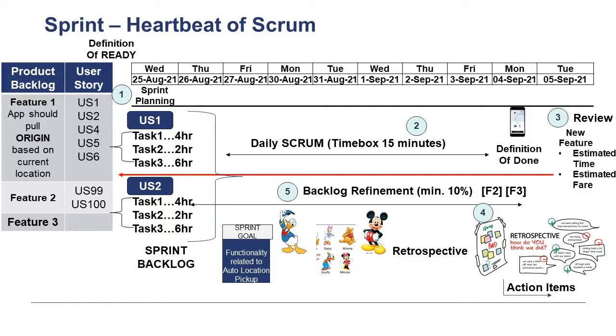So we have seen the five events in Scrum. I talked about sprint planning, daily Scrum, sprint review, and sprint retrospective. Many of you may be wondering what the fifth event is — it is actually the title of this video: the sprint itself. The sprint is regarded as an event which is a kind of an envelope or container for all these four events — sprint planning, daily Scrum, sprint review, and sprint retrospective. That constitutes the five events of Scrum.